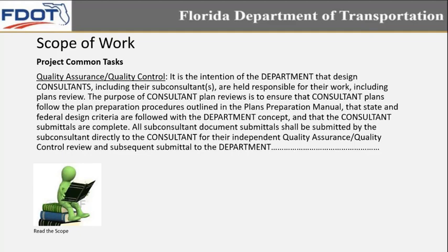And not just the prime consultant, but also the sub-consultants. It also clearly outlines the hierarchy that any work produced by sub-consultants should go through a quality control procedure with the prime consultant. Now there's a lot more to it, but I just wanted to give you an overview that quality control is state law, and on top of that, it's in the contract.